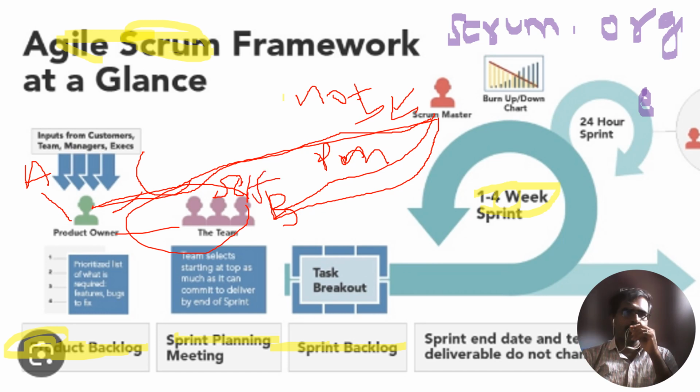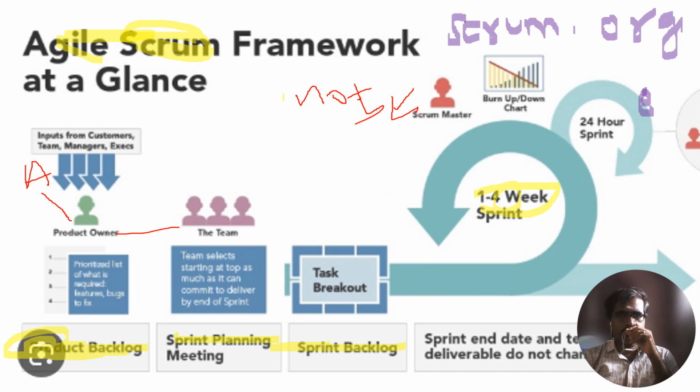A strategy meeting is a kick-off meeting held to discuss product strategy and come up with the product vision, define epic user stories, that is high-level requirements, and define detailed user stories to make the product backlog and create the product roadmap.